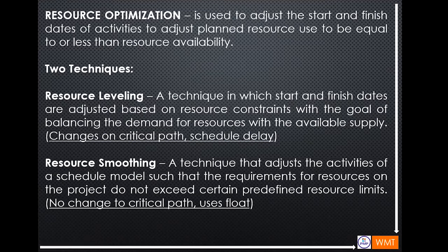And then for the resource smoothing technique, it adjusts the activities of a schedule model such that the requirements for resources on the project do not exceed certain predefined resource limits. So this technique will not change the critical path because it uses the float.